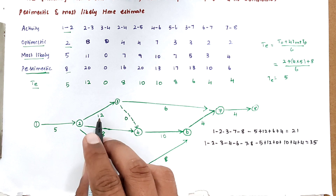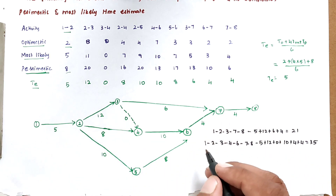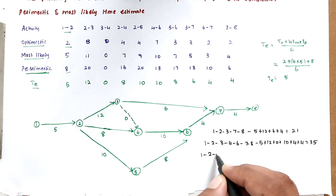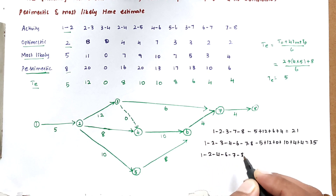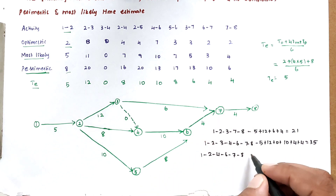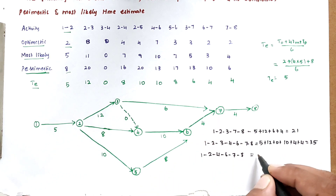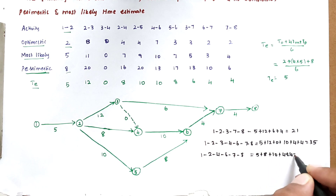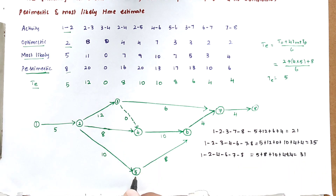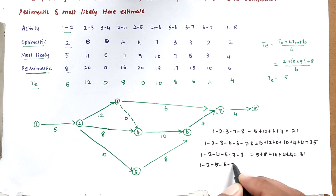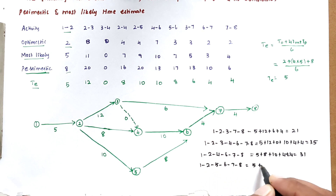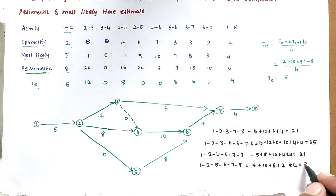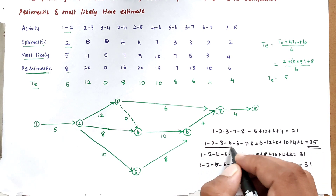Path 3: 1-2-4-6-7-8, with duration 5 + 8 + 10 + 4 + 4 = 31. Path 4: 1-2-5-6-7-8, with duration 5 + 10 + 8 + 4 = 27. Wait — correcting path 4 total: 5 + 10 + 8 + 4 + 4 = 31. The highest value among all paths is 35.